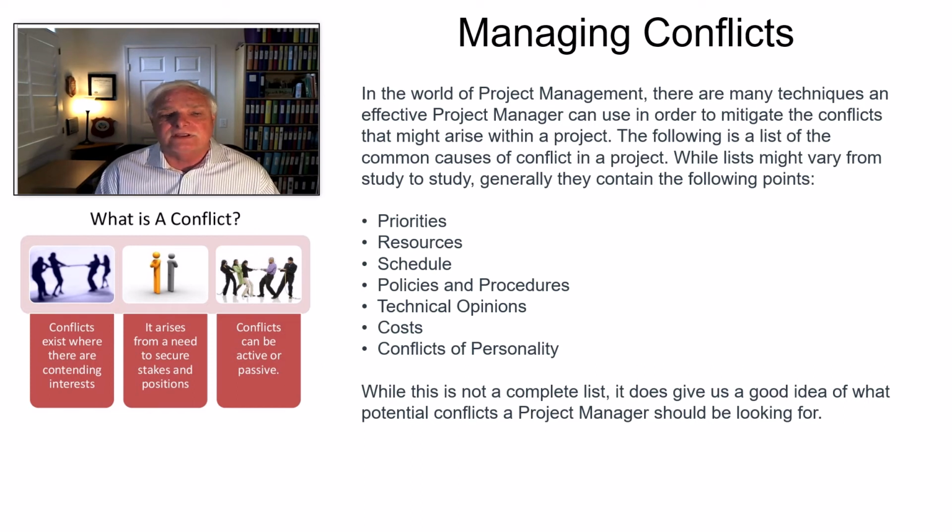That can cause conflict. You have technical opinions where you could have different SMEs, subject matter experts, or different people on the project who think that things from a technical perspective should be different, and there is no way for them to express their opinion. That will cause conflict. Lack of funding from a cost standpoint, where we can't fund certain activities until a different area of a project causes it. And then, of course, you have certain people that just don't play well with each other. They are not the kind of people that are user-friendly towards being around other people. So there are personality issues that come up, and all of these can cause conflict.